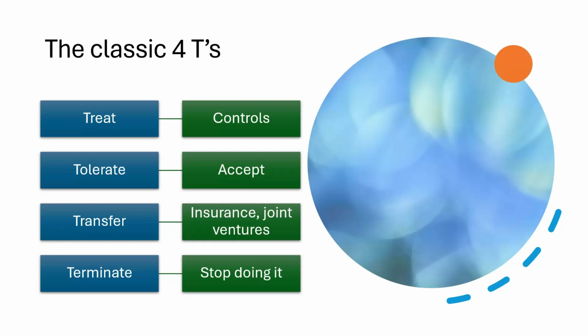And if we think that risk is too high, we'll assess our risk and say, we've assessed it, and this is the likelihood and the impact. This is where we think it is. This is its rank. We can put controls in place to try and bring that risk down. And the controls, as we talked about, can impact either the probability that something is going to occur or the impact.